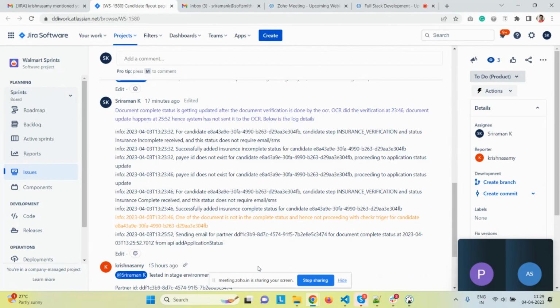The release process is a very, very critical activity in the entire development. It is not one activity after which everything is done. Development is one small activity. I call it 10% of the activity in the whole project. Testing takes 30 to 40% of the activity, because developers never do regression testing. They just say my code always works, my code is always right. That kind of concept.